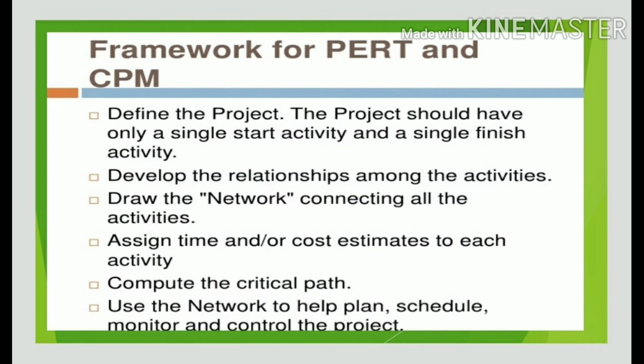And next is the framework of PERT and CPM. First, define the project. The project should have only a single start activity and a single finish activity. Develop the relationship among the activities. Draw the network connecting all the activities.